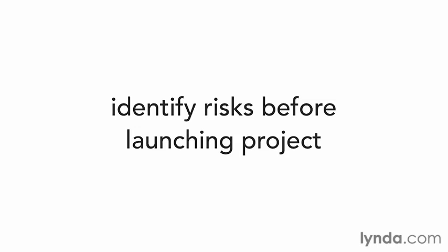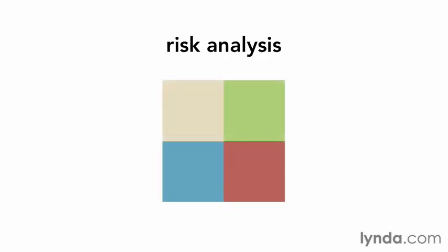For a small project, make a rough estimate of the likelihood that the risk will occur and the impact it would have if it does. For example, with the relocation project, you think a construction delay is very likely and can have a large impact if the delay pushes the finish date out. Since this risk is likely and would have a large impact, you would plan ahead for how you would handle that risk if it occurred.